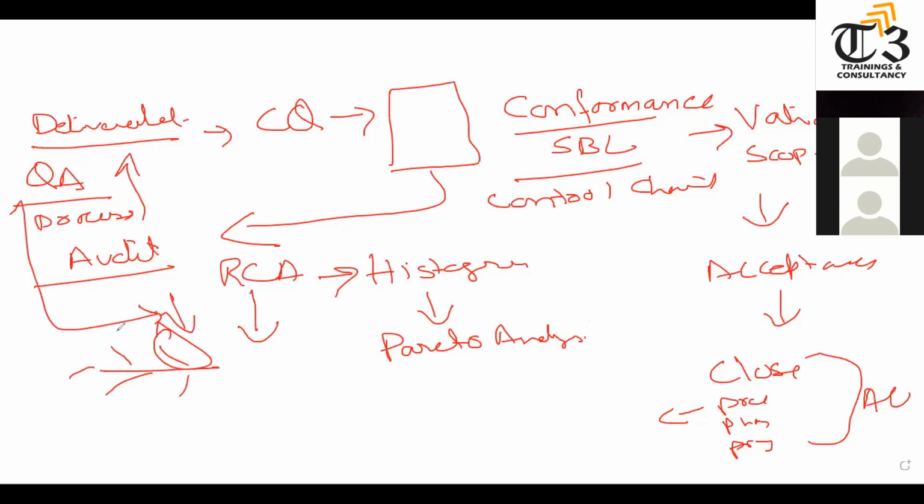Who? The quality assurance guy. They will submit the change request to the management that we need to fix it, so we can proceed further. Also, we will have the tally sheets on a daily basis. We call them check sheets. If there are deviations between the control charts, that is, why we could not reach the same 98.5 or whatever it is, these tally sheets will help us see that, okay, we have wrong parts applied, we have rusted parts applied, and because of that we have deviations. So that was the quality part.